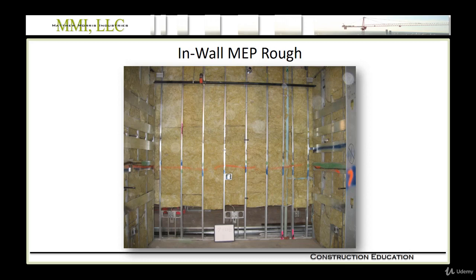And not too long ago, we did this system of spray painting, where every different contractor was given a different color of spray paint, and they would go in the room and spray paint the wall when their assemblies were done. When the general contractor went in and saw all the different colors on the wall, that meant that the subs were complete and we could hang drywall.